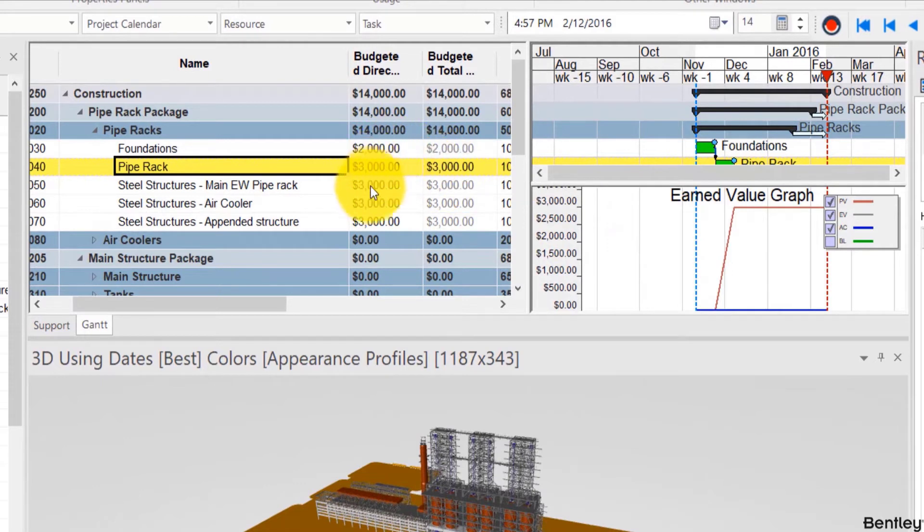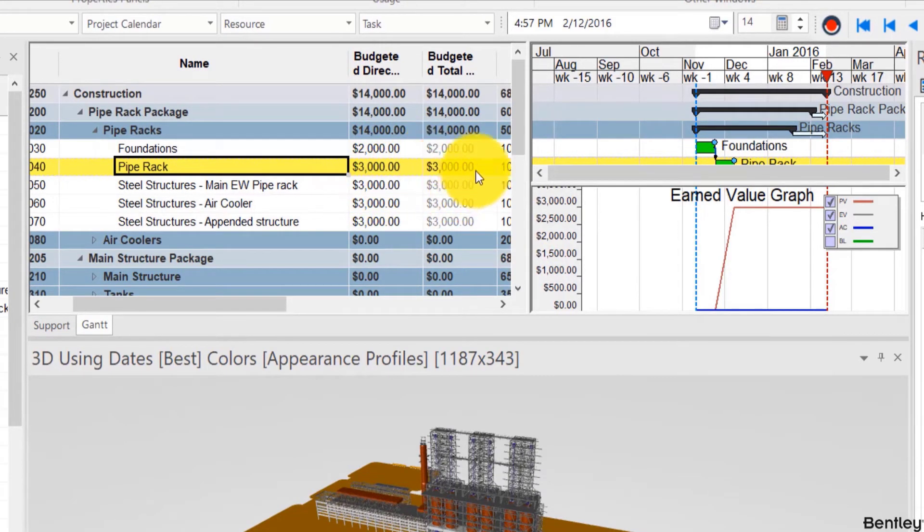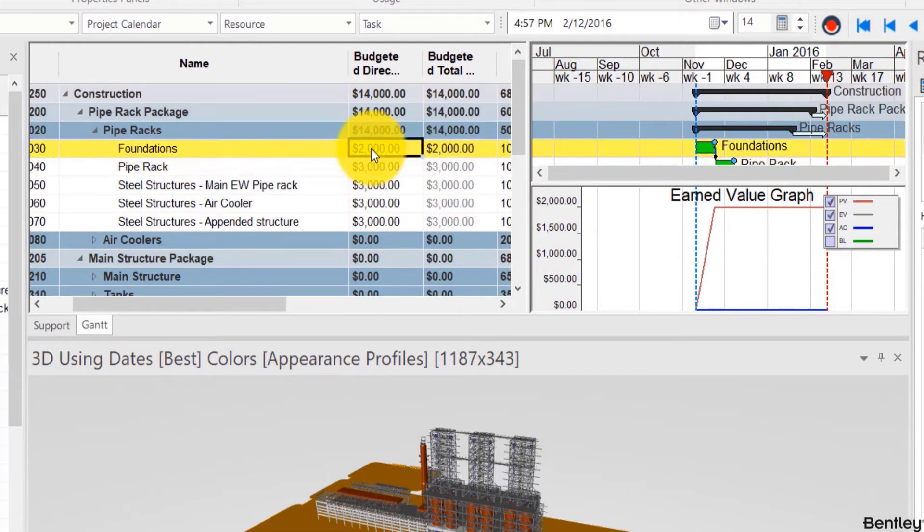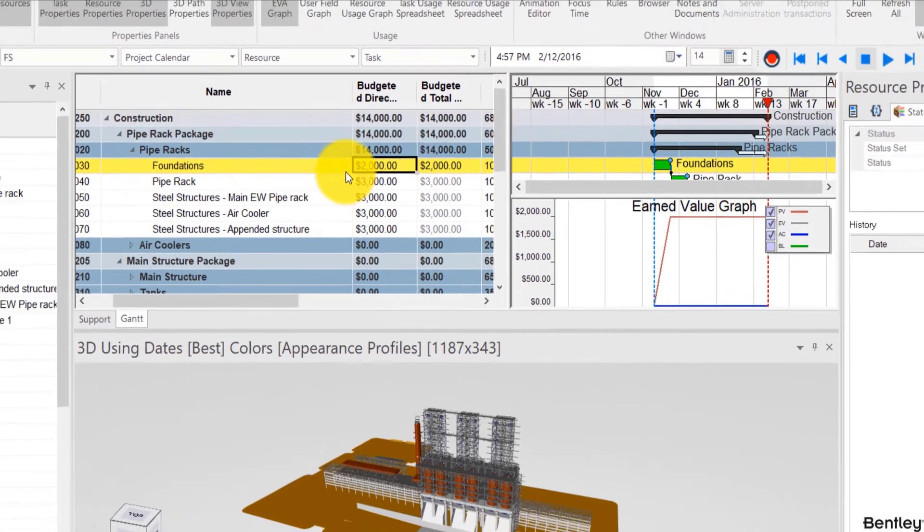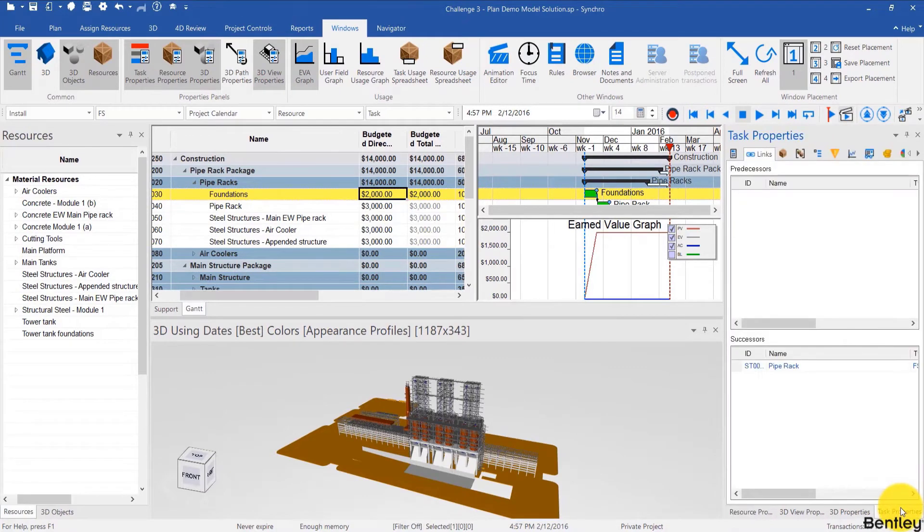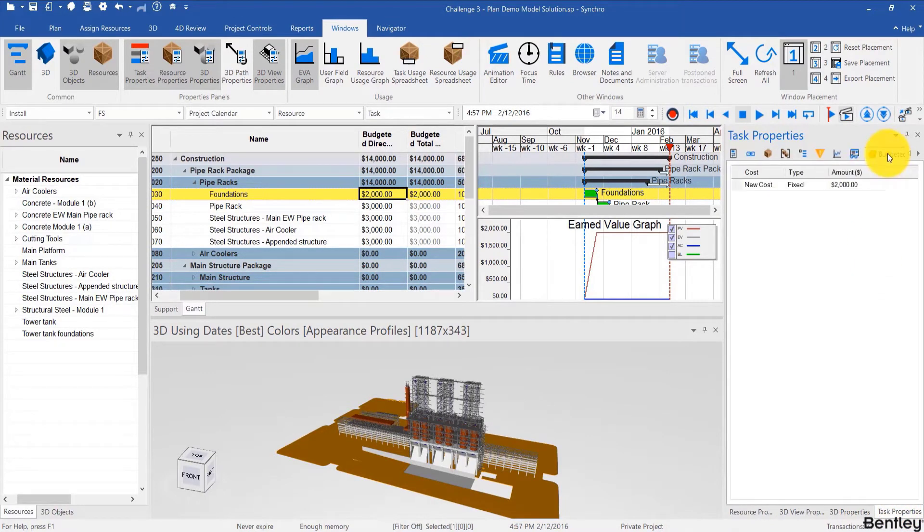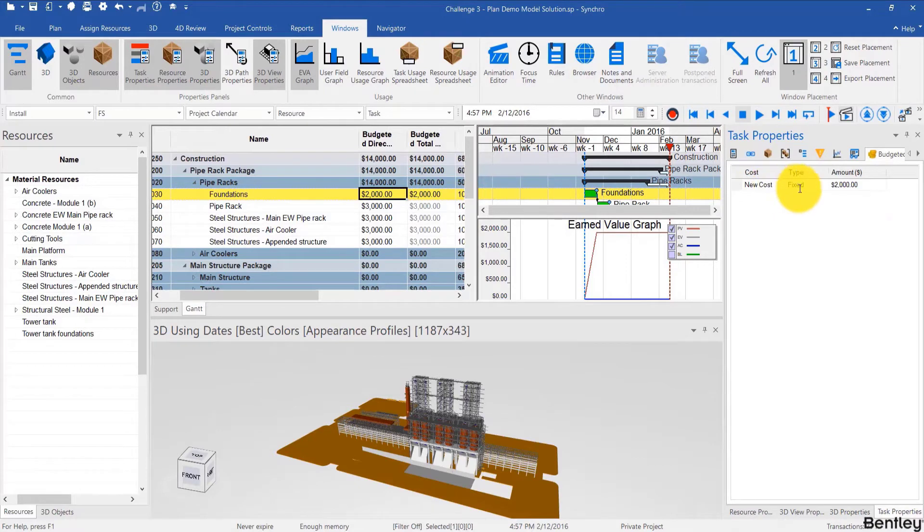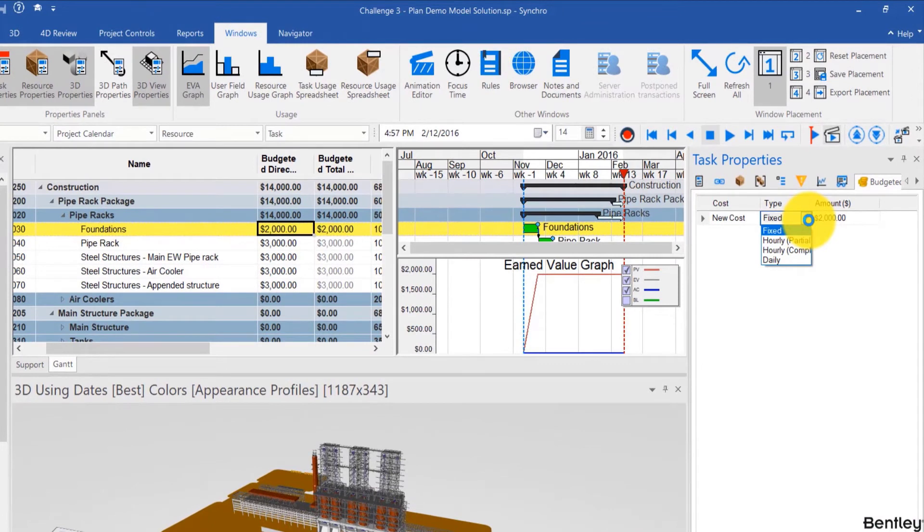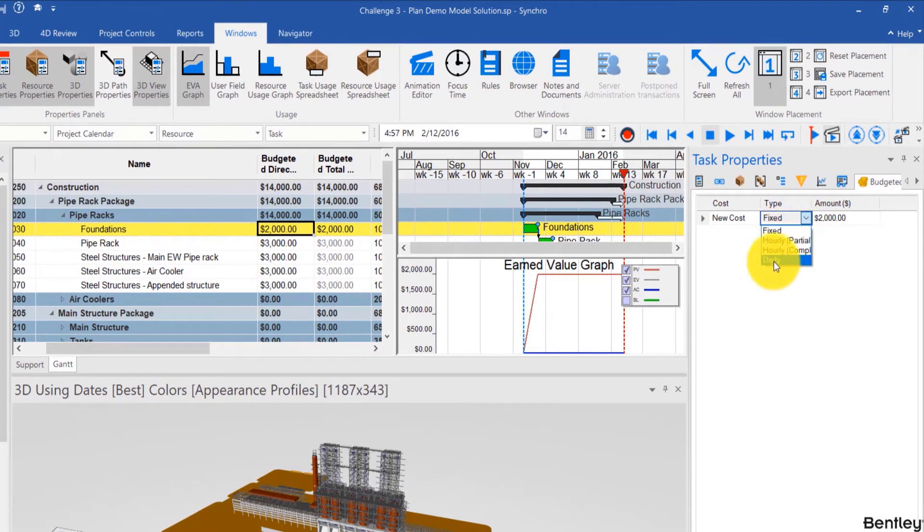Now these are direct costs. Before we move on to indirect costs and therefore the total, we want to talk about how these costs are added. Right now they're fixed so if I go to task properties and then to the cost icon we see the cost that I just added, new cost fixed. Now if you want to add a cost that is variable, for example duration based, you can change it to hourly or daily.